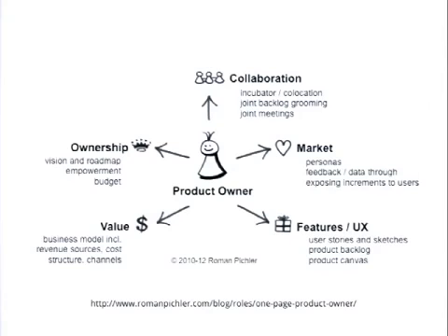This is great. Ideally, it should be somebody who uses the CMS on a regular basis, and not just somebody that the client assigned to it because they want to make sure it doesn't go over budget. It should really be somebody that can get engaged throughout the build and make decisions and give you useful feedback. And you really should expect a certain level of engagement because, like I said, this is absolutely the most important person on the project. It can make it or break it. And I've seen this happen. A project that was really vague in the beginning but ended up going really, really well because the client was really engaged and really involved.